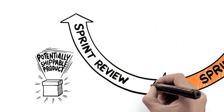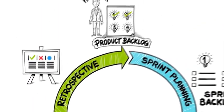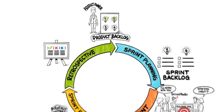The team conducts a sprint review on the product and a retrospective on the process. Then they choose the next chunk of the backlog and the cycle repeats.